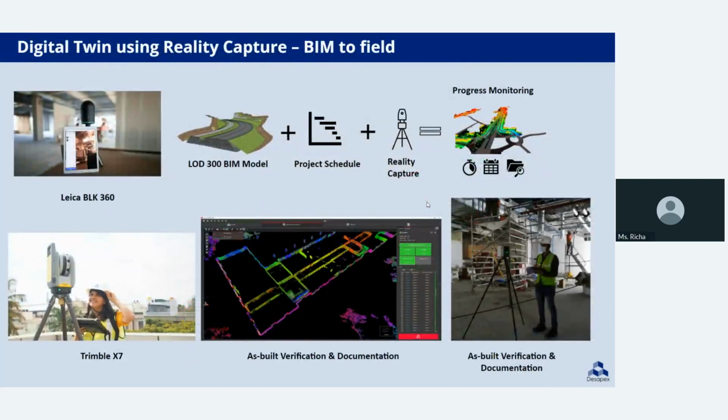Digital twin. Regarding digital twins using reality capture, here we build models by using laser scanning technology. We develop BIM models using reality capture data. And that model can be further used for as-built verifications and documentation, and also construction progress monitoring.